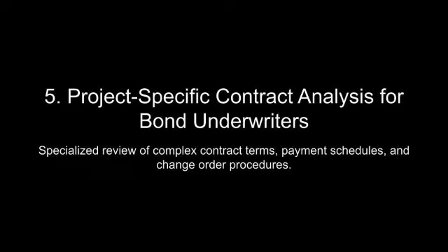For instance, flow-down clauses may require subcontractors to adhere to the same performance standards, timelines, and payment terms as outlined in the primary contract. While these clauses are essential for maintaining consistency across project tiers, their effectiveness depends on clear and enforceable language. Ambiguities in flow-down provisions can lead to disputes, particularly when subcontractors argue that certain terms were not explicitly communicated or agreed upon.